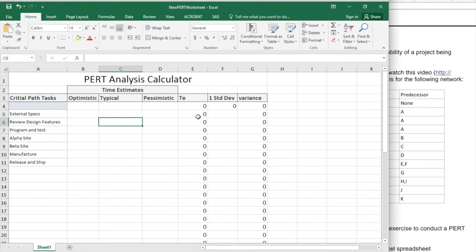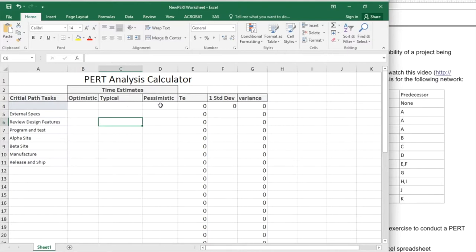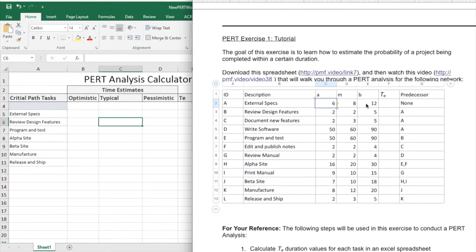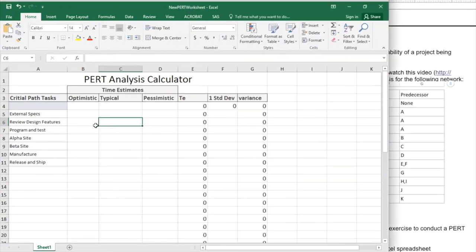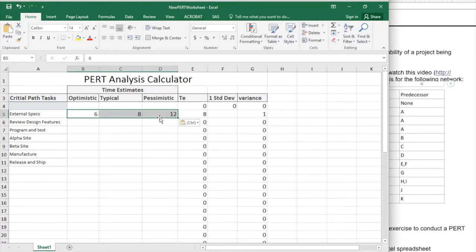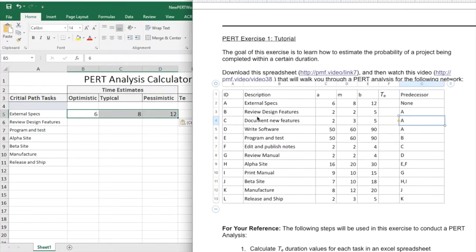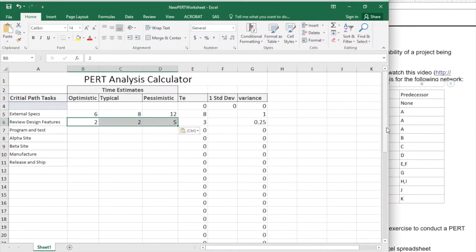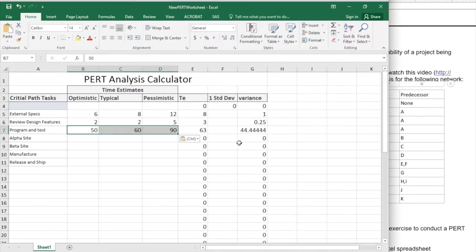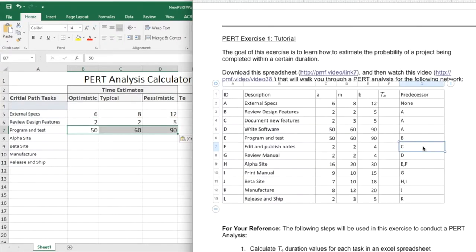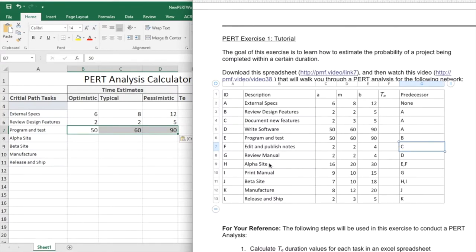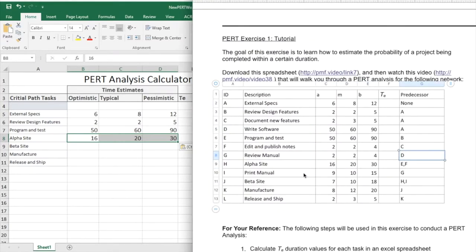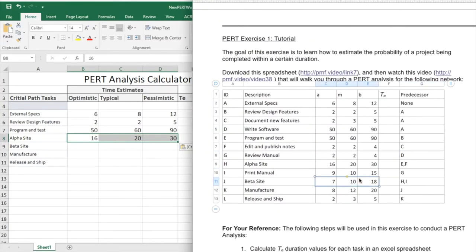Now, I don't want to paste in the TE values here. What I really want to do is I want to have the optimistic, typical, and pessimistic, so that this spreadsheet can actually do the calculations to figure out the variances. So, what I'm going to do now is I'm actually going to go back to my original exercise, and whenever I see a critical path task, I'm going to come over and paste those values in. Or you could obviously just enter those values as well.